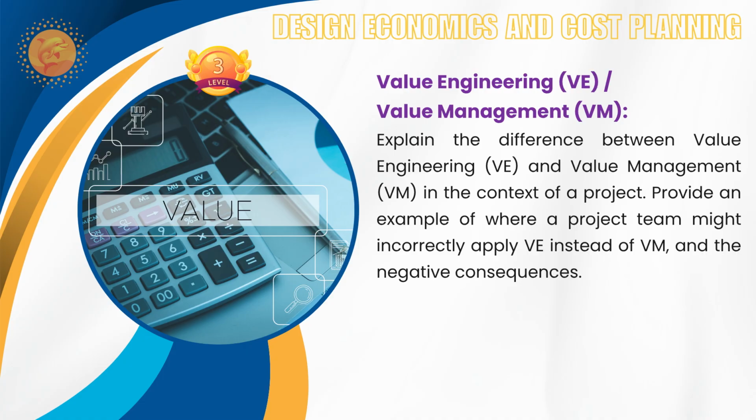Yes, Mr. Joshi, you want to say something here? No, sir, it's fine. I will only say that value management is applied at a concept stage, that means RIBA stage 0 or 1. But value engineering is applied in the design stage, that means RIBA stage 2 or 3. I will only give this one. Good, sir. Yes, of course.